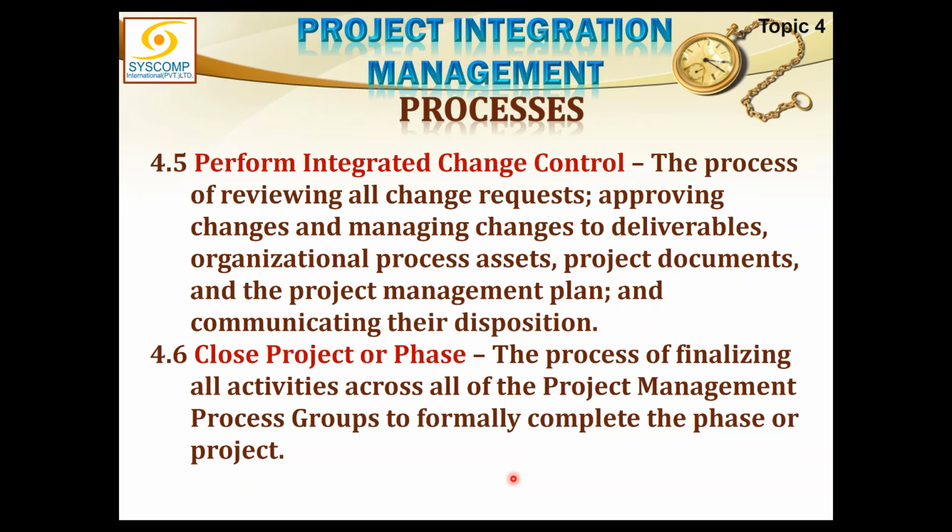What if a change request is not approved? The news about the disapproval is to be sent back to the source and also to execution, as execution should not take it for granted that a change request moved by someone will definitely be approved, and so we should start working that way.